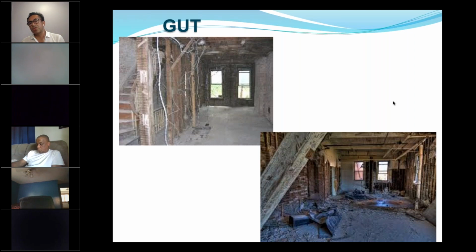Because if for whatever reason you start the rehab and you're doing electric, plumbing, or you're doing demo work without pulling a permit, and the neighbor or the inspector happens to drive by and they see contractor trucks, or they see trash outside or dumpsters, any sign of construction, guess what? They're gonna not only put a stop order on your project, but they're gonna make your life hell. They're gonna send you to court. They're gonna give you tickets, okay?